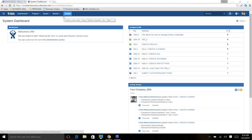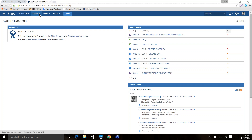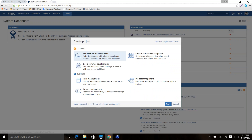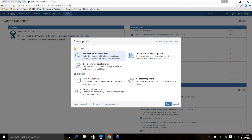The first thing I need to do is set up the JIRA tool, which we already did — I created my account using an ID and password, and JIRA provided a unique link for my website. The second step is to create a project. Once you click create project, select the Scrum software development template, because that's what we are trying to do. If you pick any other template, it will have different fields which may not be exactly for Scrum.